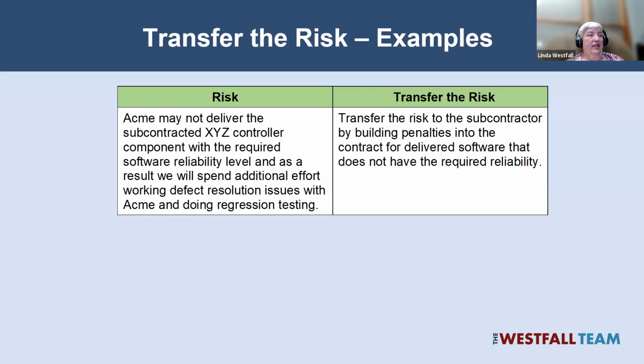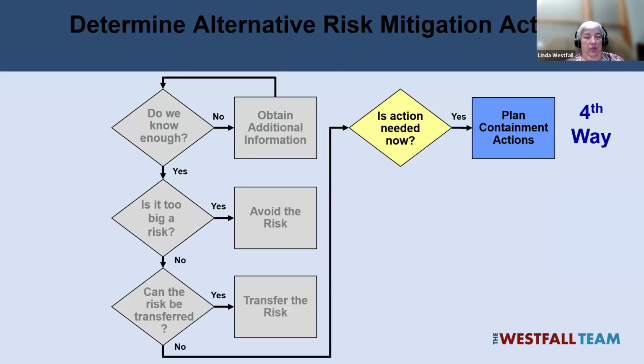Back in the day when we used to charge for long distance, and I worked for the telecom company, in our contract, if we had more than 3 minutes of outage per site per year on average, we owed them penalty money to make up for the lost revenue because the switch was down and they couldn't provide long distance service. So you can potentially transfer it to someone else.